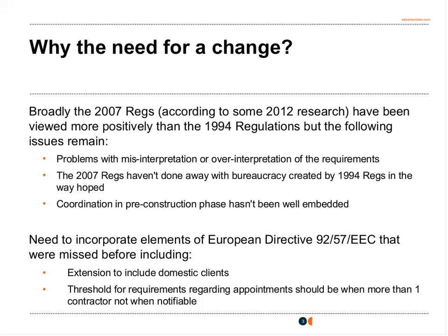Separately, there is a need for the regulations in 2015 because of there being actual problems with proper implementation of the 1992 EU directive. That hasn't, we are told, been properly incorporated into the UK. And the key areas which the 2015 regs are seeking to rectify are firstly that the regulations must now apply to all construction projects, and that includes domestic client situations.